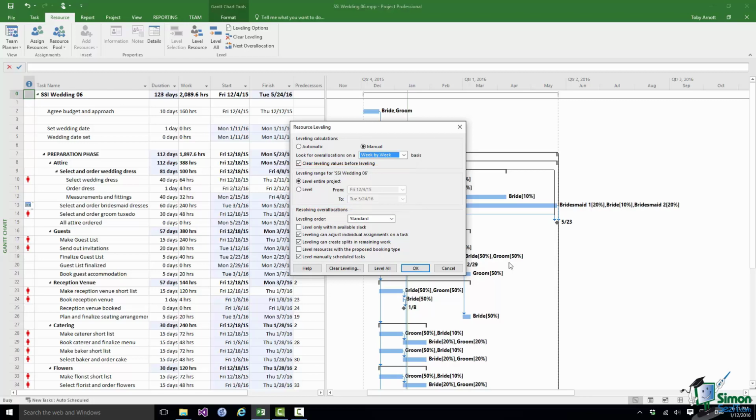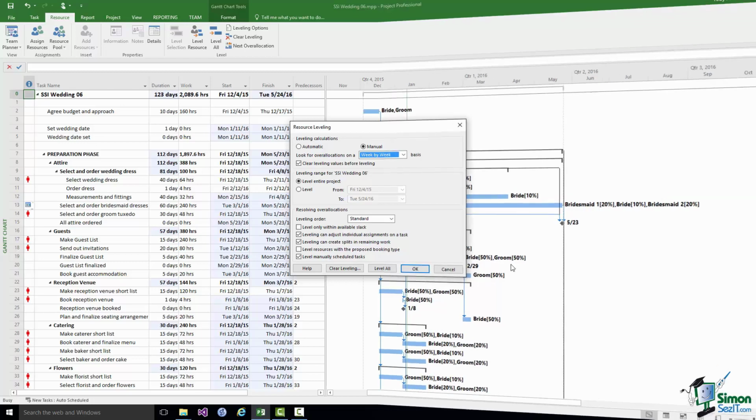What can sometimes happen when you're working on a long project is you may, for example, have the project in phases, and over the next phase, say the next few months, it may be important that you have the resources leveled. But for phases of a project which are much further off into the future, leveling resources may be a bit of a waste of time because you don't really have the detail in yet. There's a lot more work to do on it. So leveling resources over that period really is a waste of time and will flag problems that don't really yet exist. So in that situation, you might want to choose just say the next few months to level. On this occasion, we're going to level the entire project.